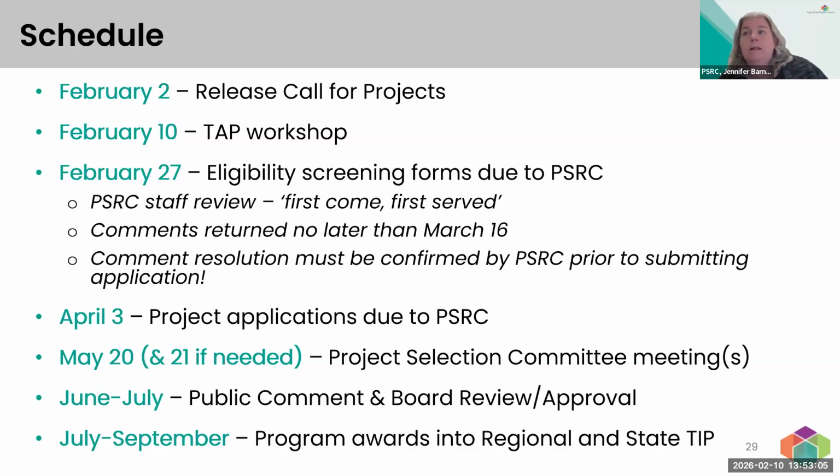That's a good question, and we definitely want the project sponsors to think through the timeline of their project, knowing that those funds need to be obligated sometime between October 2027 and June 1st of 2028, in the case of 2028 funds. Then it seems like you could probably make that work. Thank you. Okay, great question. Not seeing any others right now. Okay, Mitch, back to you.